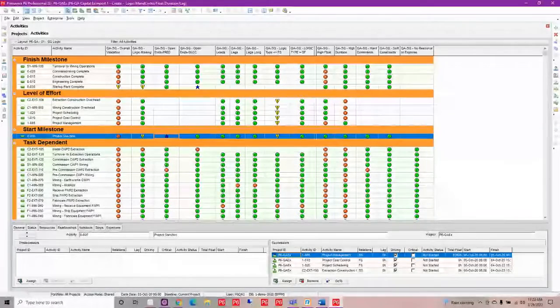Now, what that is going to do is essentially override that check. So we can let P6-QA know that I've reviewed it, and it's all right. It's fine that it does not adhere to the metrics that I set out there.